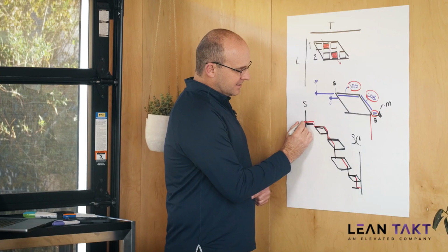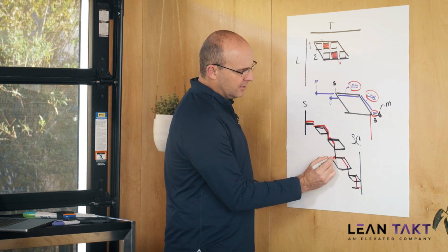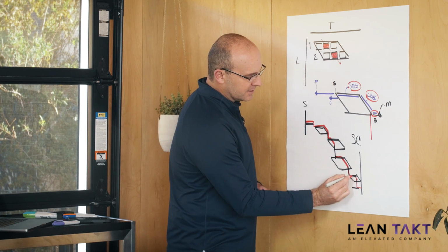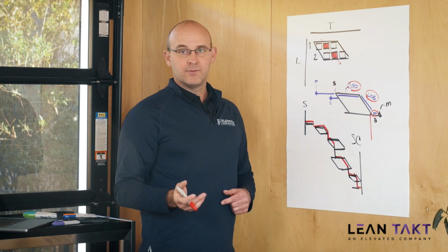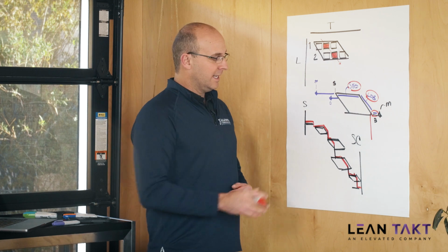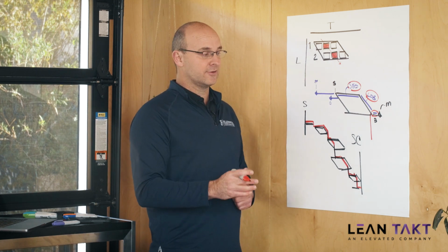So this path of critical flow, or your critical flow path, is the real critical path on your project. It's not just some random forward and backward path based on an algorithm. It's not. Your path of critical flow, your longest path, is really connected through phases.